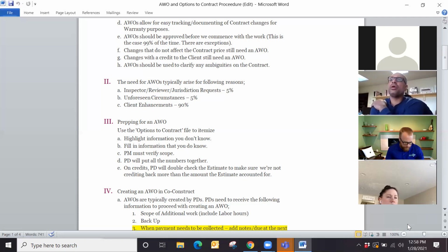But if that was already part of the contract and there was a clause, for example, COVID, it's not unforeseen. It was something which was known before. When COVID came out, we had such a crazy spike of material costs that all the vendors went from validating or keeping their quotes valid for like 30 days to a couple of weeks.